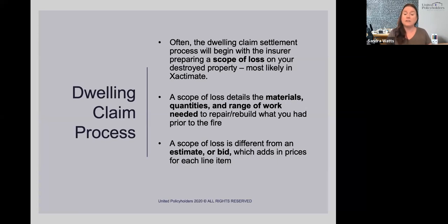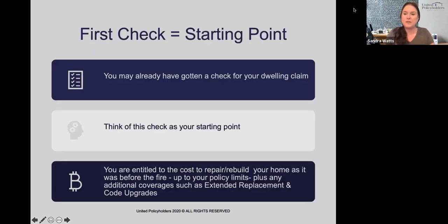The other thing is that a lot of times when you correct the scope, the estimate resolves itself. In a lot of cases, if it doesn't completely resolve the amounts issue, it narrows the situation. And then you can just focus on a few areas where the prices differ. So I hope that is understandable.